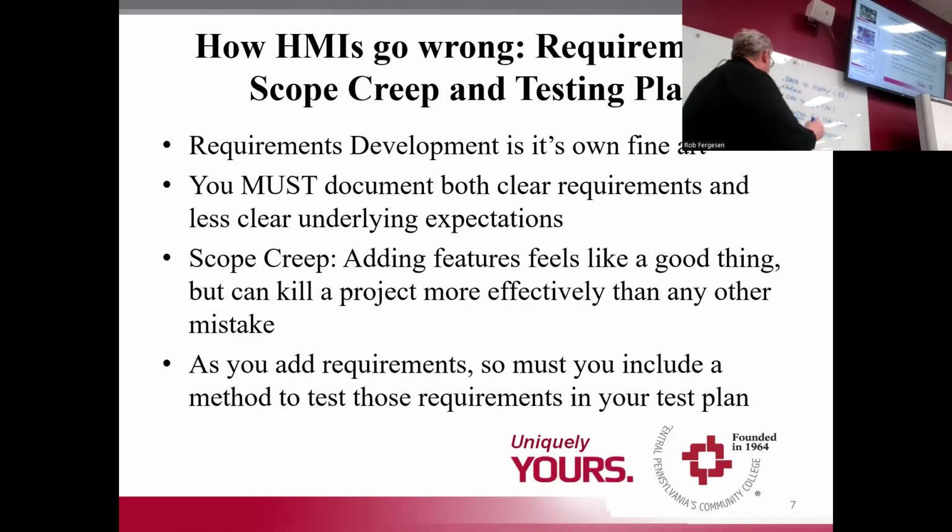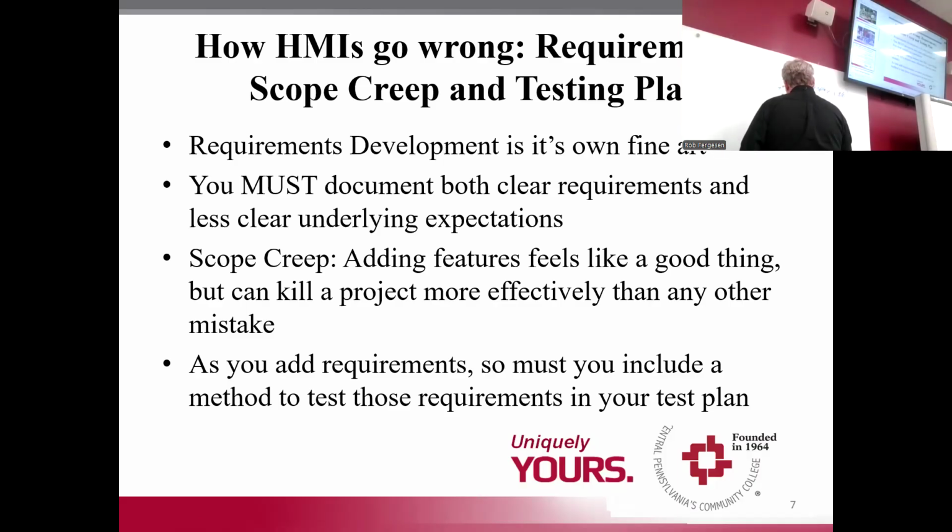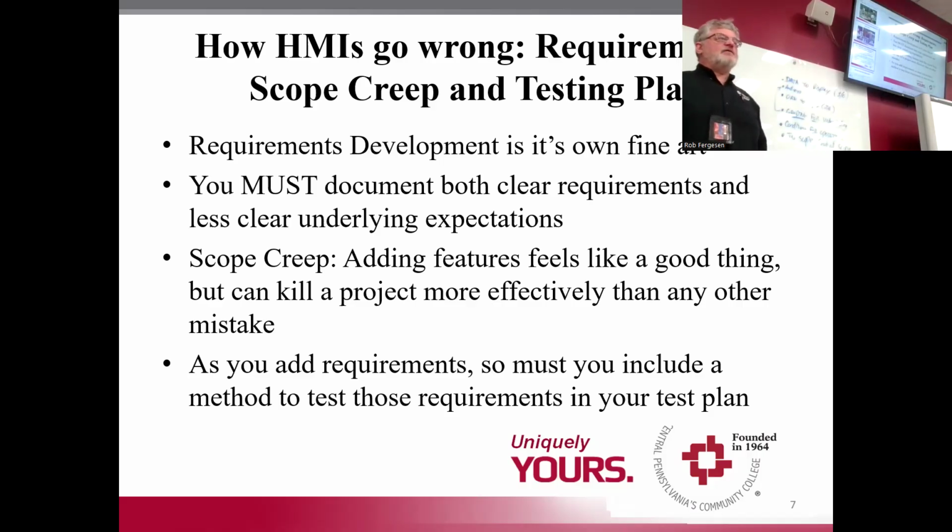So document any expectations by saying very specifically what's in scope and what's out of scope. What areas of function are in scope and what areas of function are out of scope? You really have to be very clear on that. Scope creep can kill. Like I mentioned earlier, you don't want to have a case where they keep adding requirements on you.